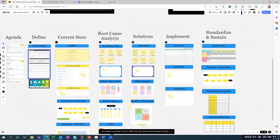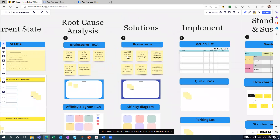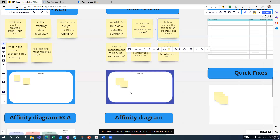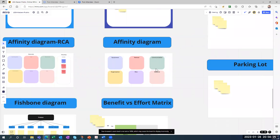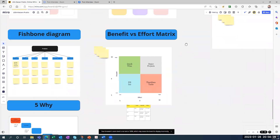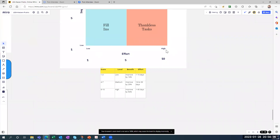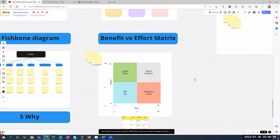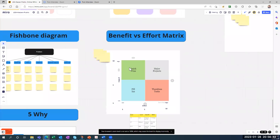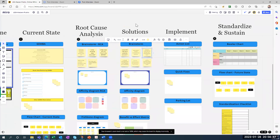We've completed root cause analysis. Now you go to the solution section — you start with brainstorming, and here are some helpful notes for that stage. You put your brainstorming solutions here, then do the affinity diagram, and then the benefit versus effort matrix. Look at the table to define what's considered low and high — ideally you want the quick wins with high impact and low effort.